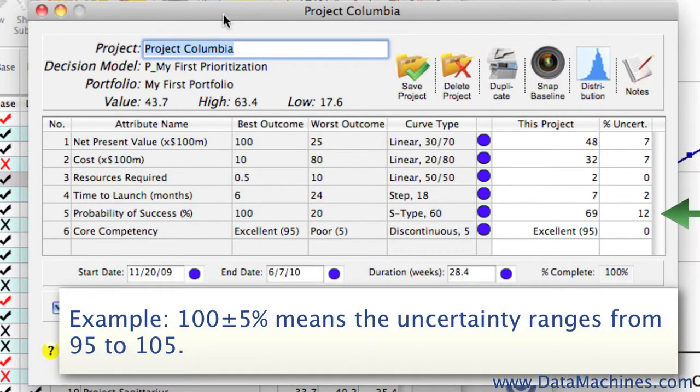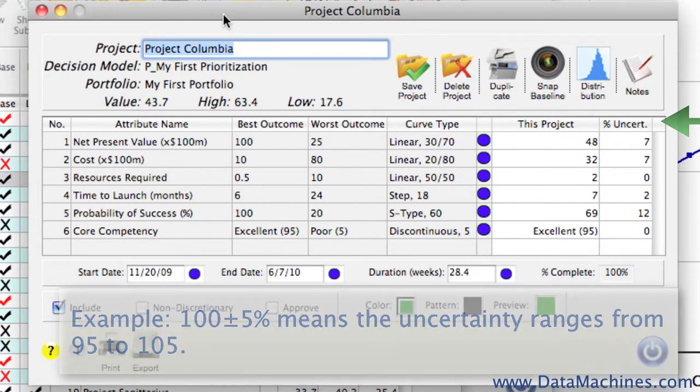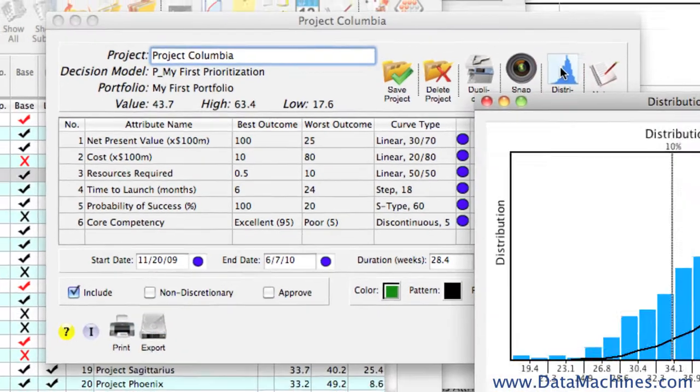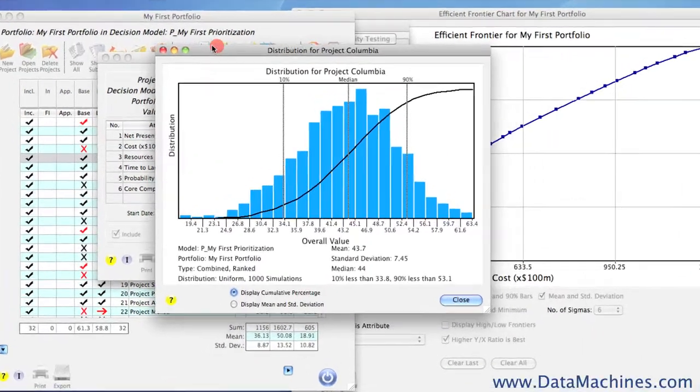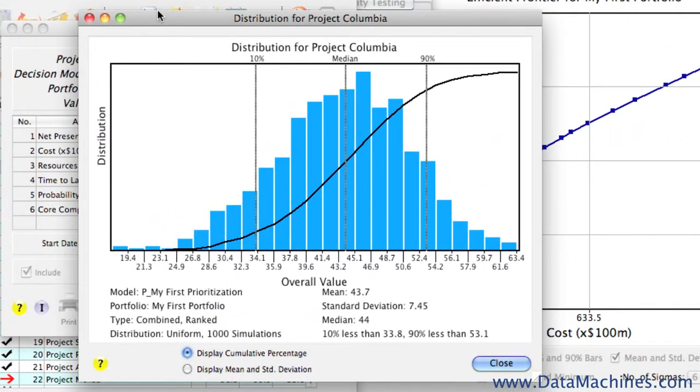The percentage is a plus minus value, so for example, a project that has a cost of 100 plus or minus 5% associated with it means that the range of uncertainty in that cost value is between 95 and 105. You can see that when we click on the distribution button at the top of the form, the distribution associated with the project appears. The cumulative distribution curve display lets you see where your 10%, 90%, and median lines are for each project, so you can see what your expected outcomes are.